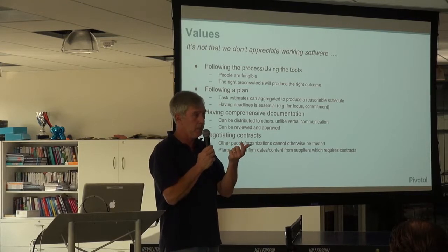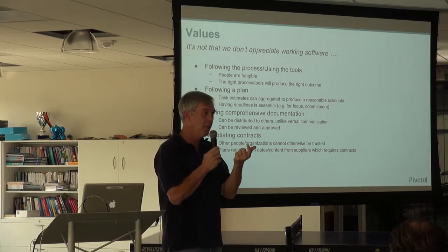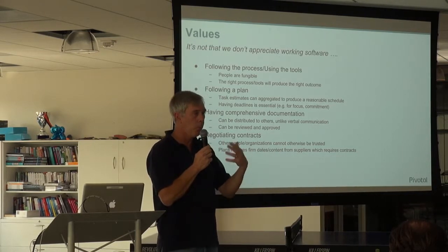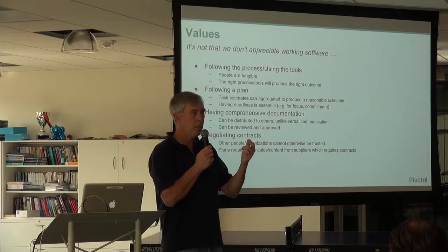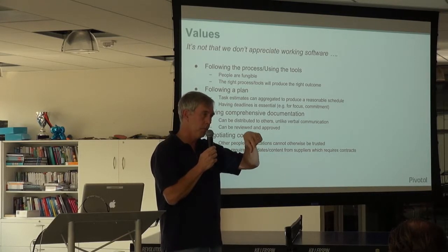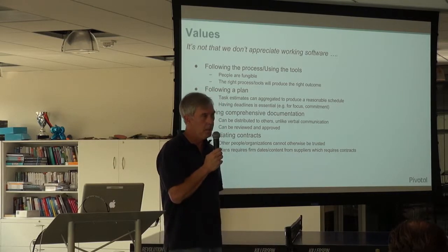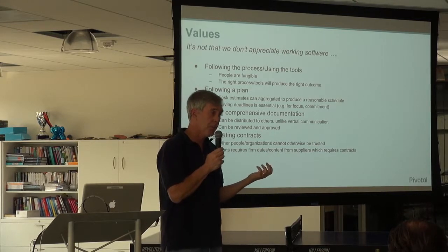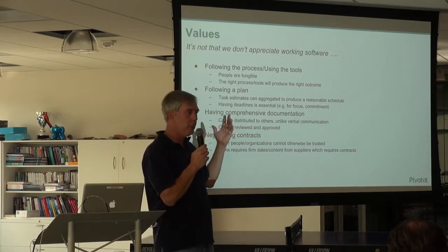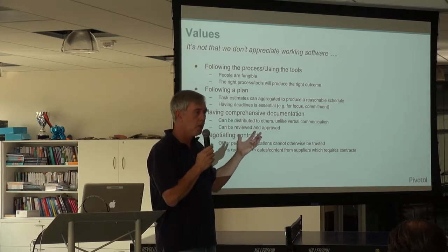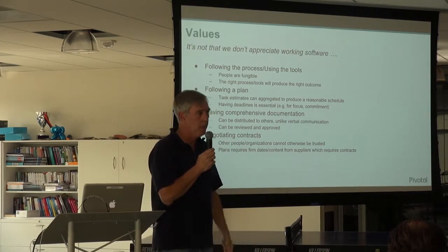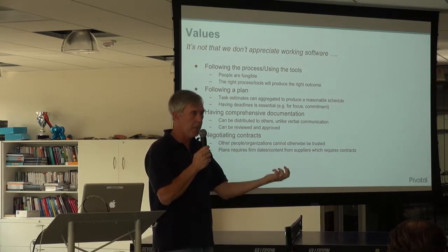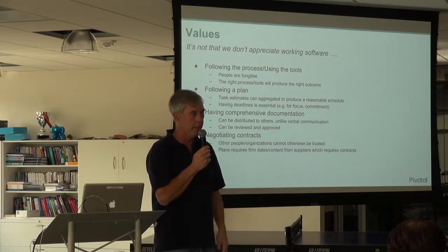If your batch size is something that takes half a day, then the whole idea of doing a plan and getting a review by a whole bunch of stakeholders, that whole process of getting concurrence and writing it down, can literally take longer than the whole duration of that particular cycle. So I think this is largely an issue of scale, and you get these big issues when you work in large chunks with lots and lots of people. So our goal is to work in small chunks with small teams of people and figure out a way to have that happen in parallel and then put it together.